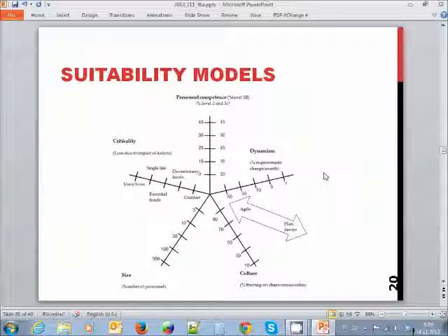Also, interestingly, the size of your crew is one aspect in this model. If you want to use face-to-face communications, it's okay to do so with 5, even 10 people. If we have more than 10 people, 12 is more or less the cutoff point where we need to have a separate manager whose only responsibility is to manage the project. Also, 12 is the cutoff point where we probably want to have 2 teams of 6 people or 3 teams of 4.